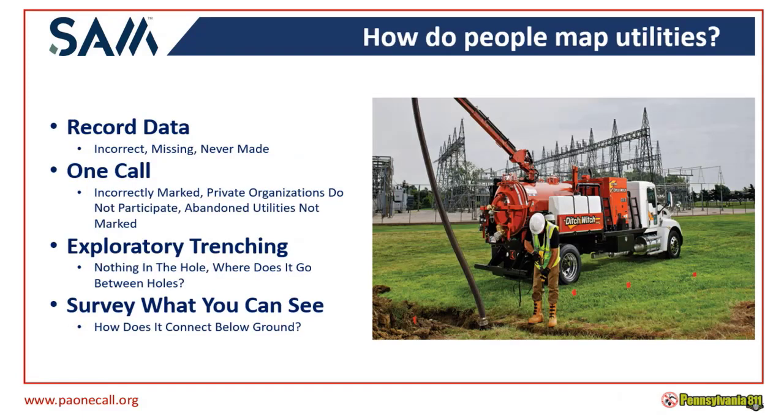So right now, the usual in project development, in the planning stage, final design, anything like that, most people only record the underground utilities either through record data. Maybe they call in a one call and some field marks were put down, and they record those. Some people do use exploratory trenching to try to find out where those utilities are. And some people just utilize QLD and QLC, quality level C and quality level D. With that being said, though, SUE could offer so much more that'll give you more accurate information that is going to save money in the long run when it goes to construction.